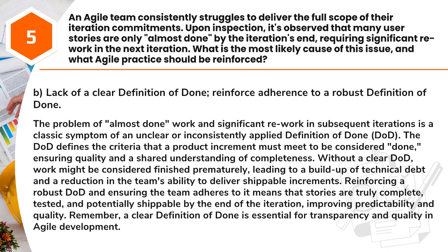The problem of almost done work and significant rework in subsequent iterations is a classic symptom of an unclear or inconsistently applied definition of done, DoD. The DoD defines the criteria that a product increment must meet to be considered done, ensuring quality and a shared understanding of completeness. Without a clear DoD, work might be considered finished prematurely, leading to a buildup of technical debt and a reduction in the team's ability to deliver shippable increments.